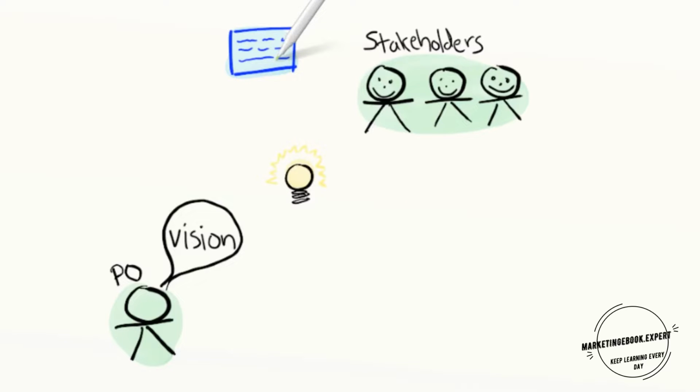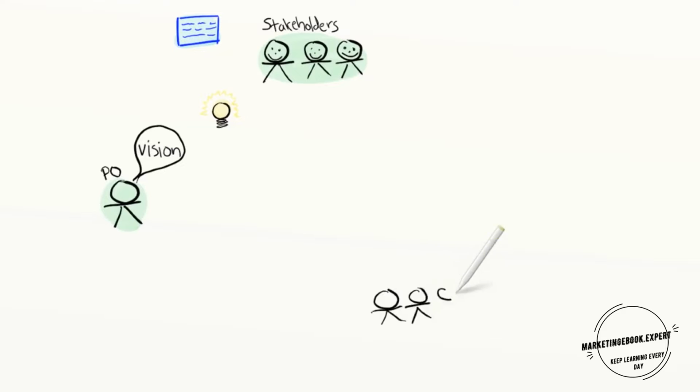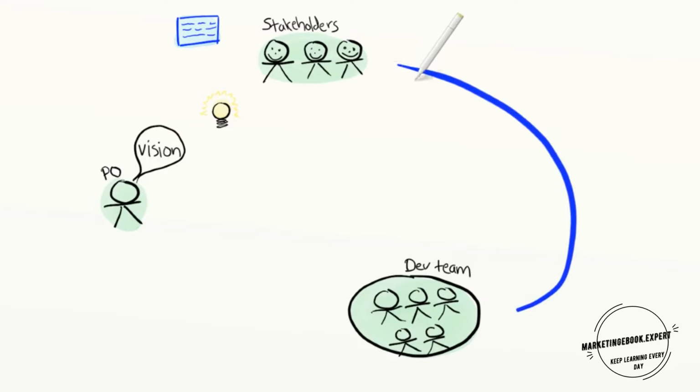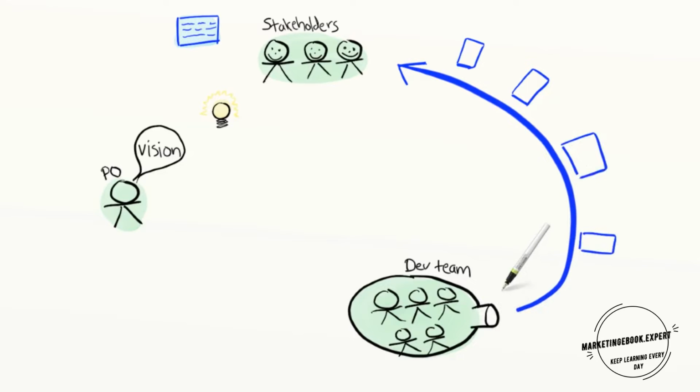Now, somebody has to actually build a system. So here they are, a small, co-located, cross-functional, self-organizing development team. Since this is an agile team, they don't save up for a big bang release at the end. Instead, they release early and often. In this case, they usually release about 4 to 6 stories per week. So that is their capacity.